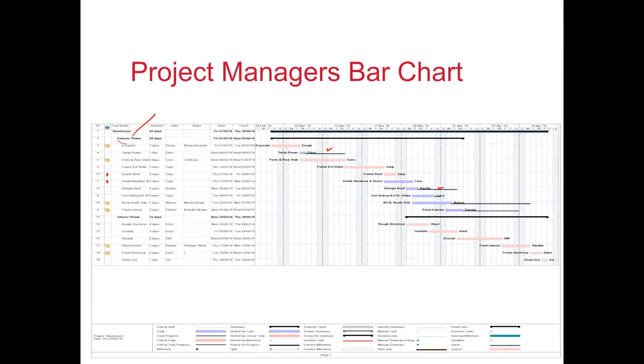Right. So the problem is that if you share all this information, it's possible that your subcontractors may not turn up on time, and they could possibly feel the liberty to use and eat up all the float without your permission. So the float is sort of a leverage which the management team has to keep close to its heart. So you will not like to share this information with all the stakeholders in a classical situation.